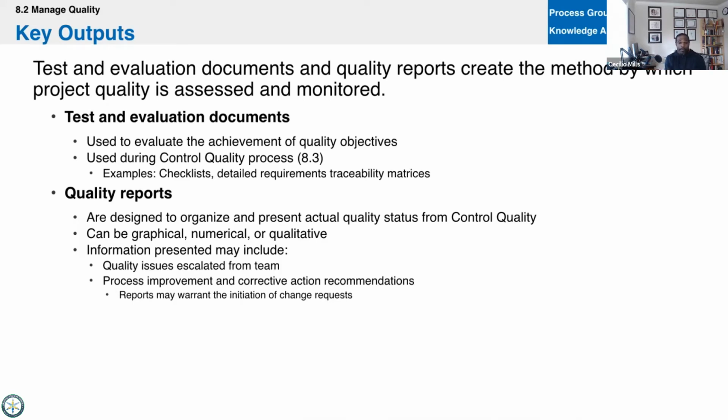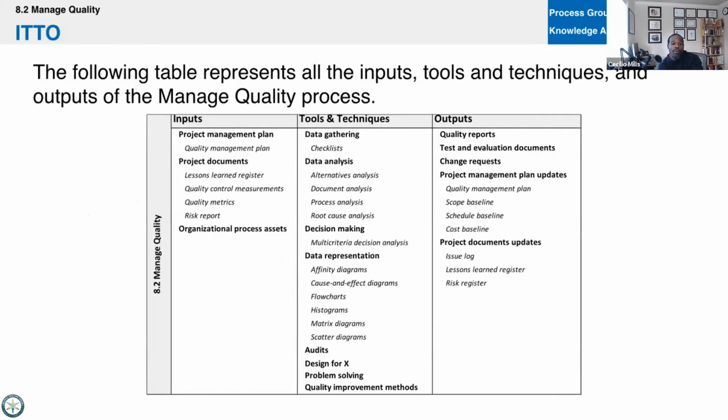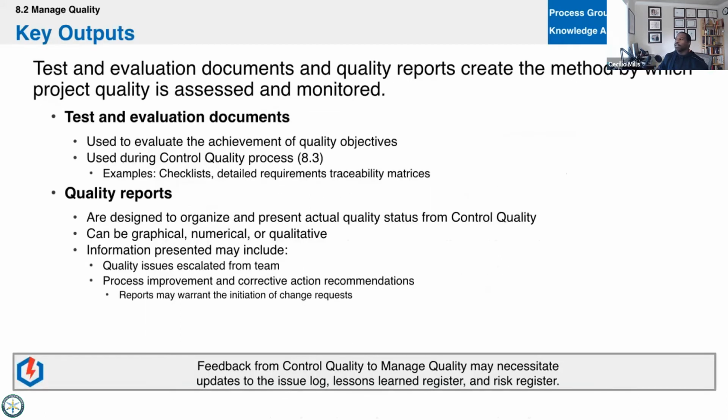We're looking at the deliverable. Did that donut rise? Does it have enough glaze? That's quality control. Now the output: if I go back, quality control, the output of that is going to be the quality control measurements that happens in monitoring control. And you see how that's an input here. The data that says, okay, for every 100 donuts, the picker is recording 10 bad donuts. Okay, that's a 10% defect rate.